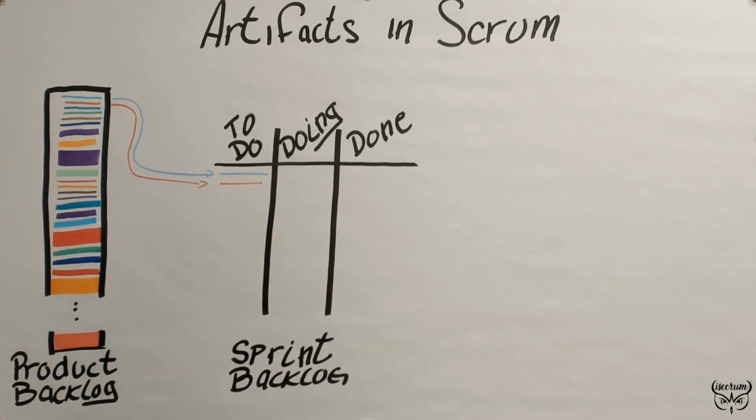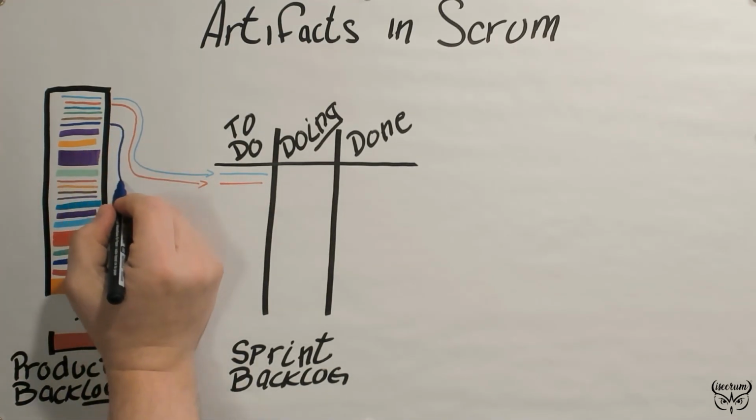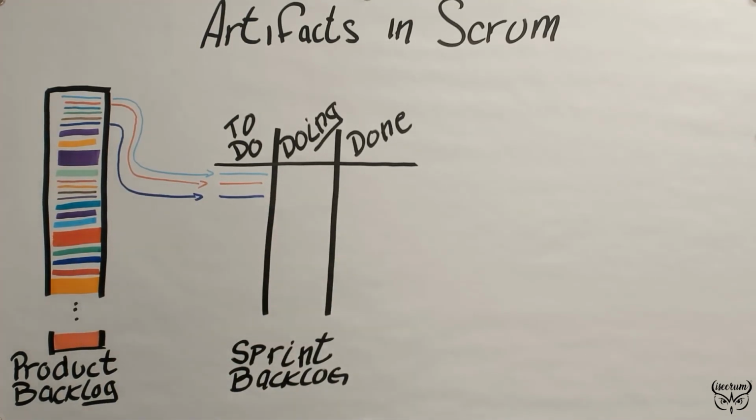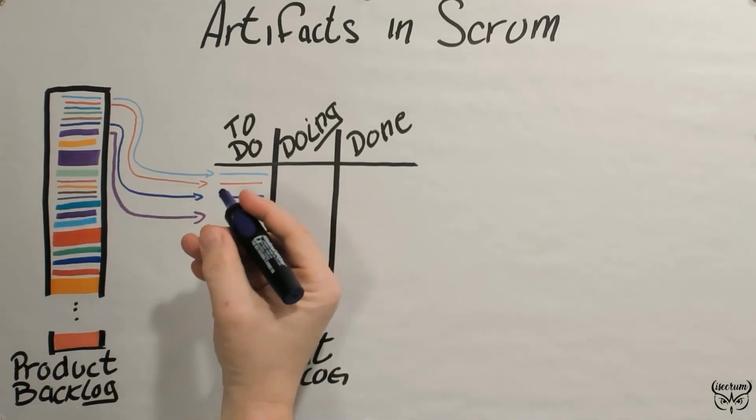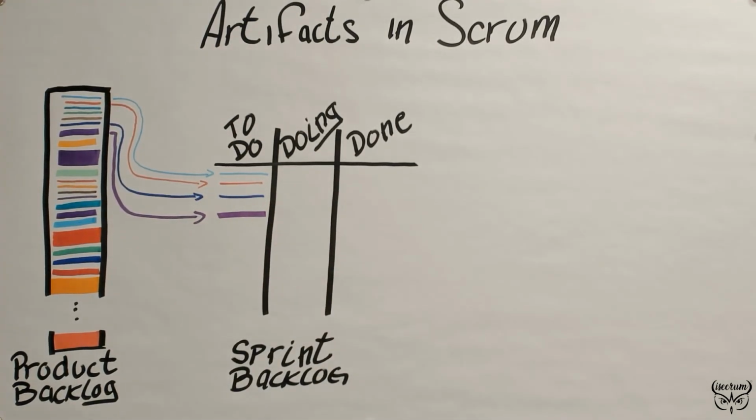Here we've chosen to bring in several product backlog items that agree with our sprint goal. As long as the team agrees that we can get all of the work done during the sprint, which we will probably use empirical data like velocity to help us determine, then we are in agreement that this is the right collection of product backlog items for the sprint.